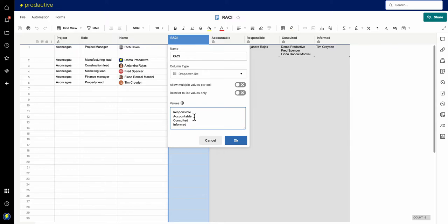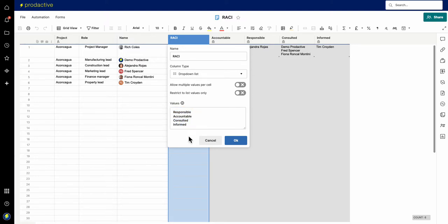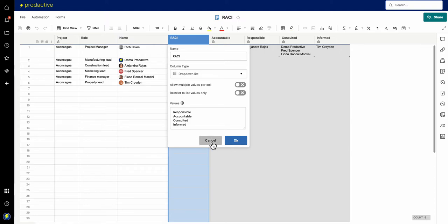The most common one is the RACI, and typically you can only have one person who's accountable, then various people who are responsible, and others who are consulted and informed. This can be used at the start of a project or any time during to clarify accountabilities. Personally, I find it's best used for decision making when you need to agree who's got decision rights to avoid delays.